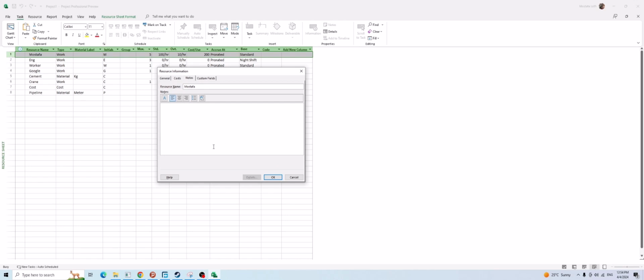You can put extra information, copy a hyperlink, even insert a document, PDF, Word, different objects for each resource. For example, you can put the contract of the resource here, but I do not recommend it because it will increase the size. I mean the file. If you copy paste the text, it's fine.